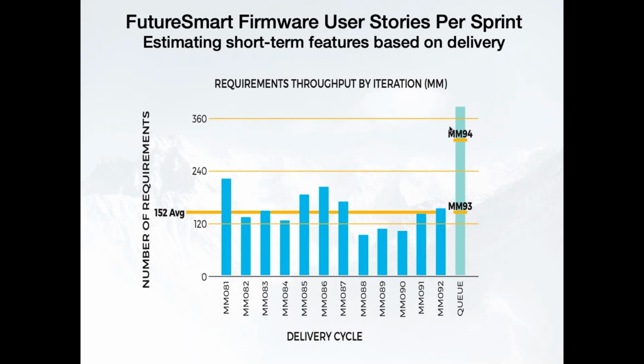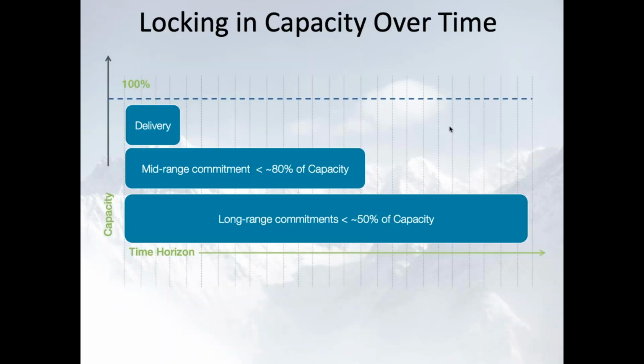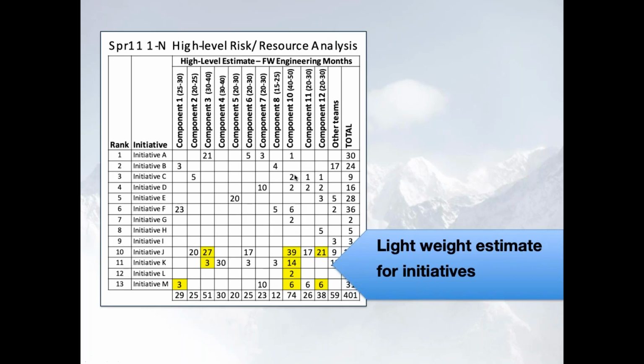We did need to have other steps in place to make planning decisions on different ranges. When you can use less than 50% of your capacity, it's going to be pretty easy to commit 18 months out in the future. As you get tighter into the range, you can start to commit another level of your capacity with this, but eventually you're releasing work into the system based on your ability to get things done, and it's a prioritized backlog for that.